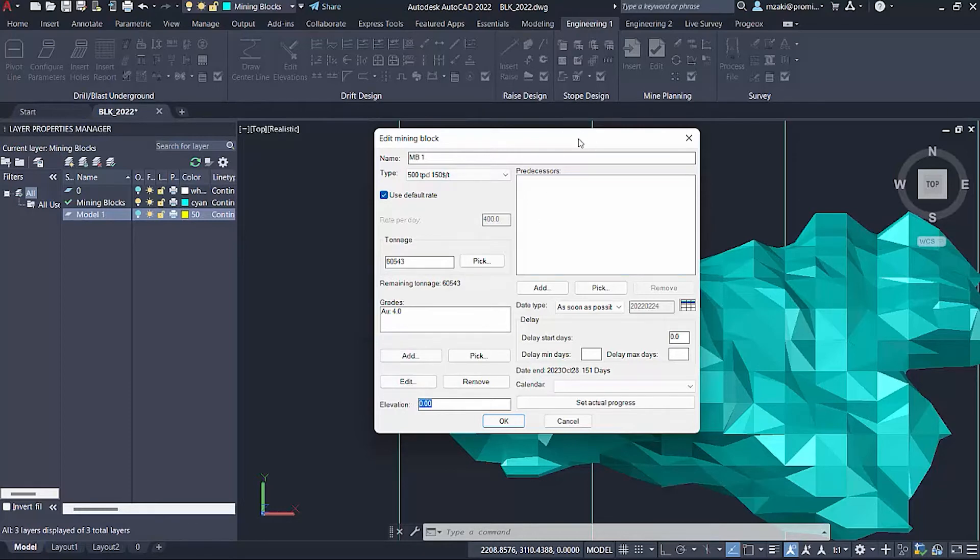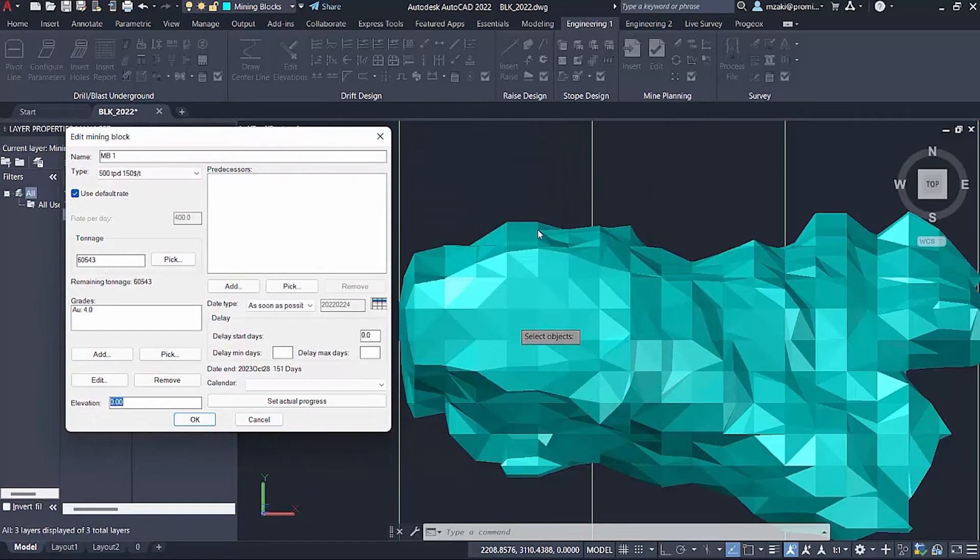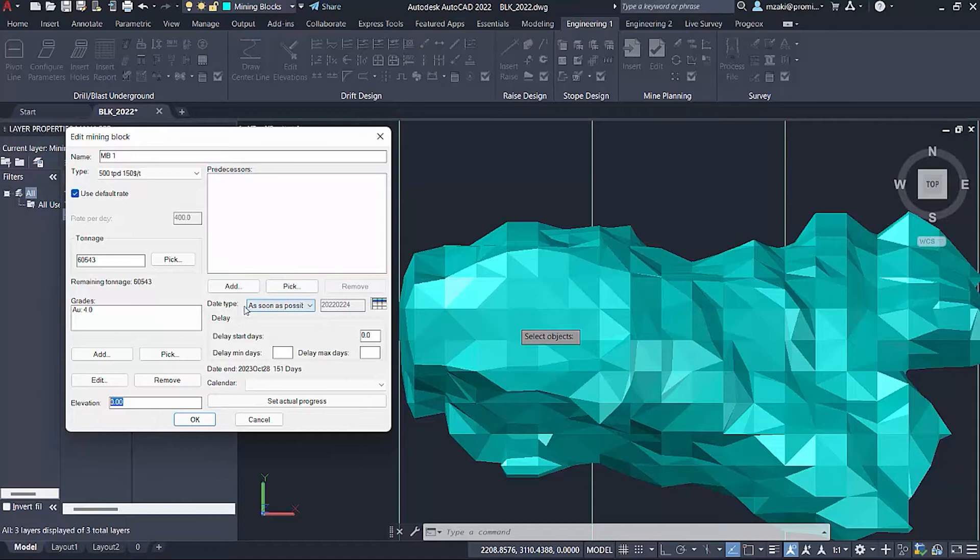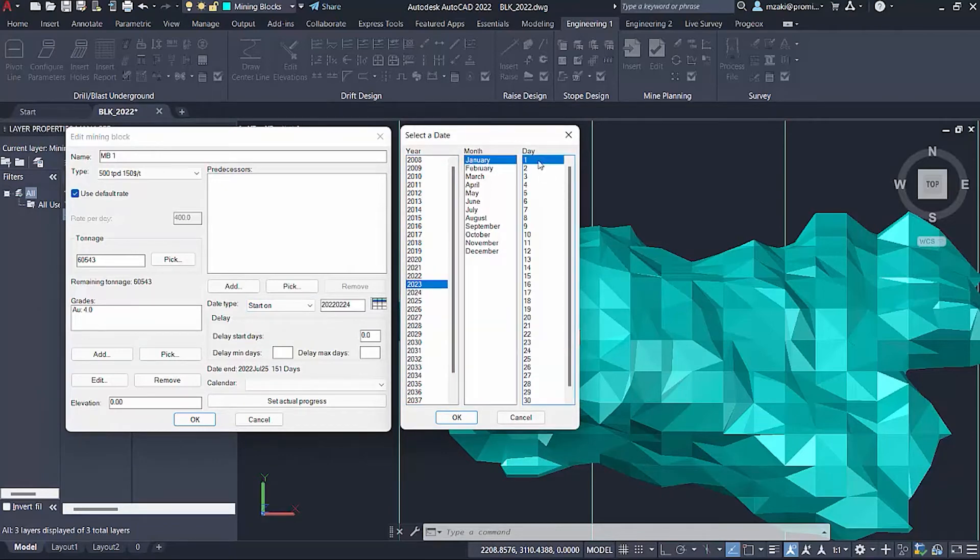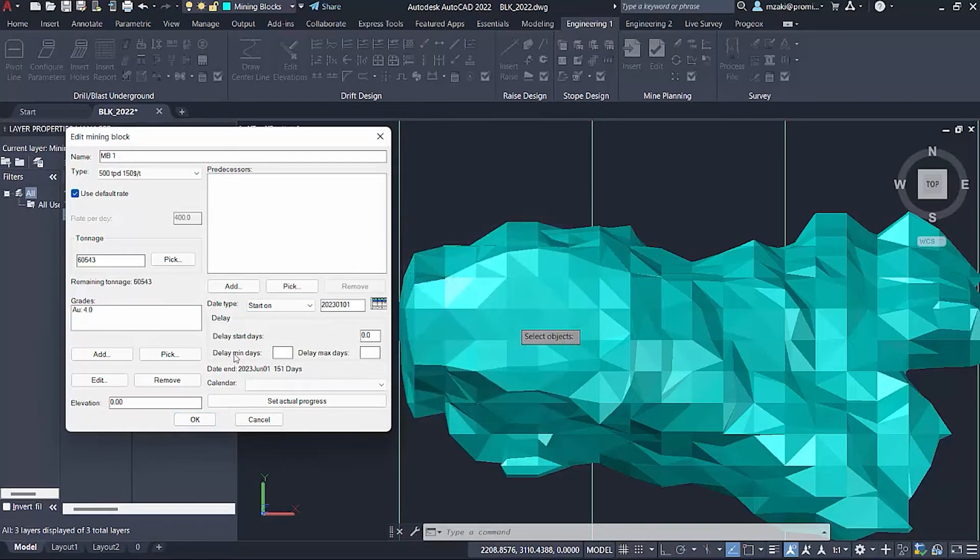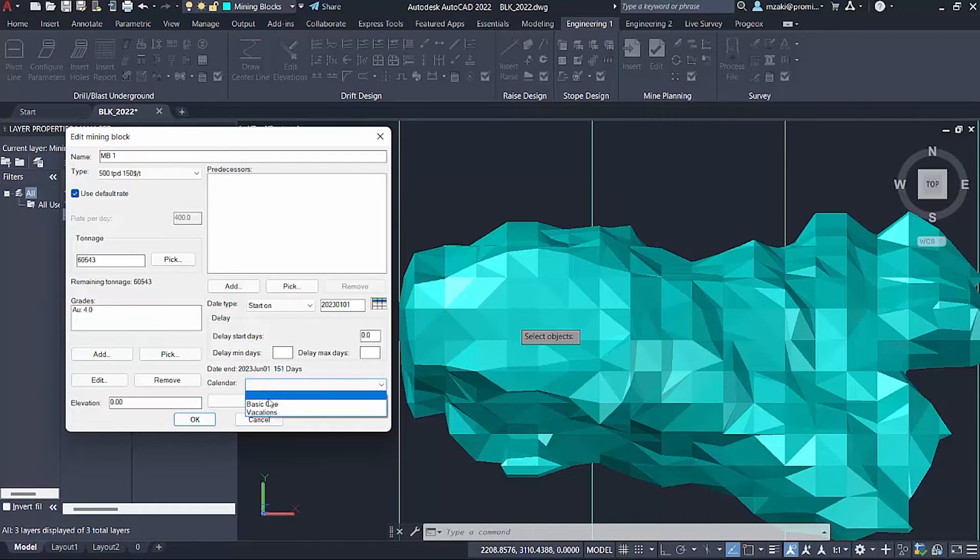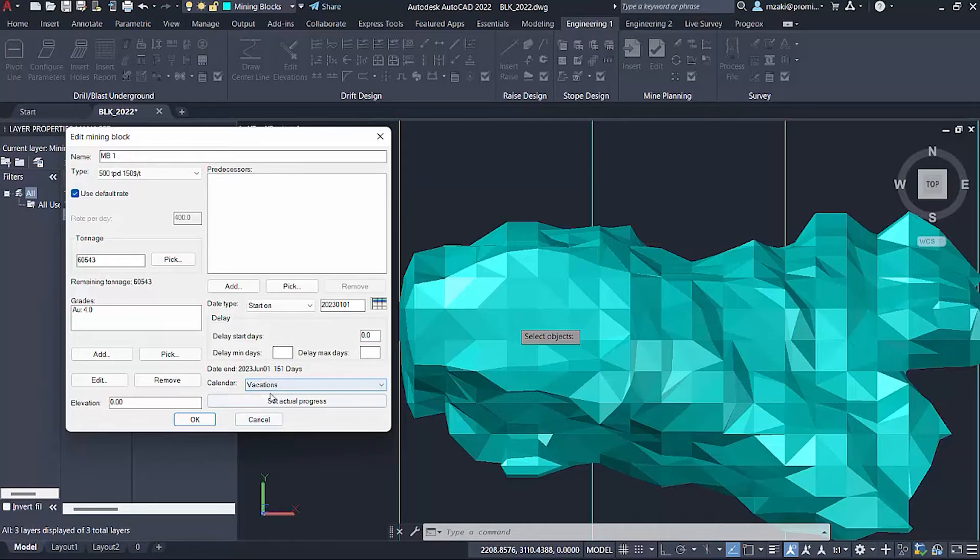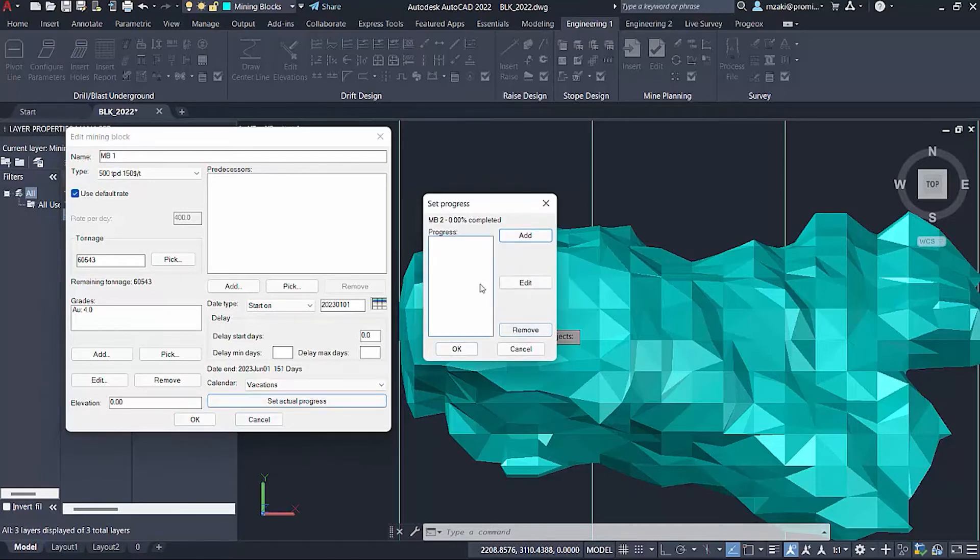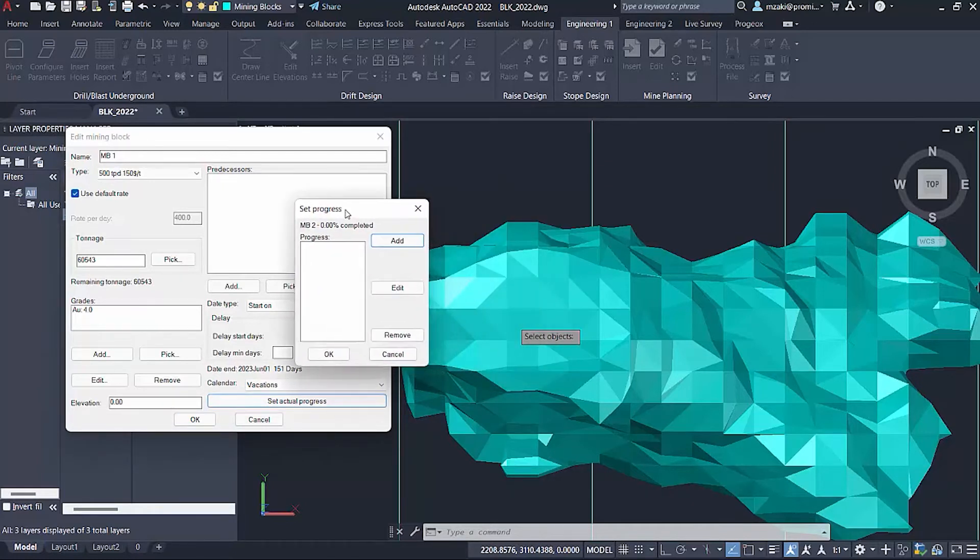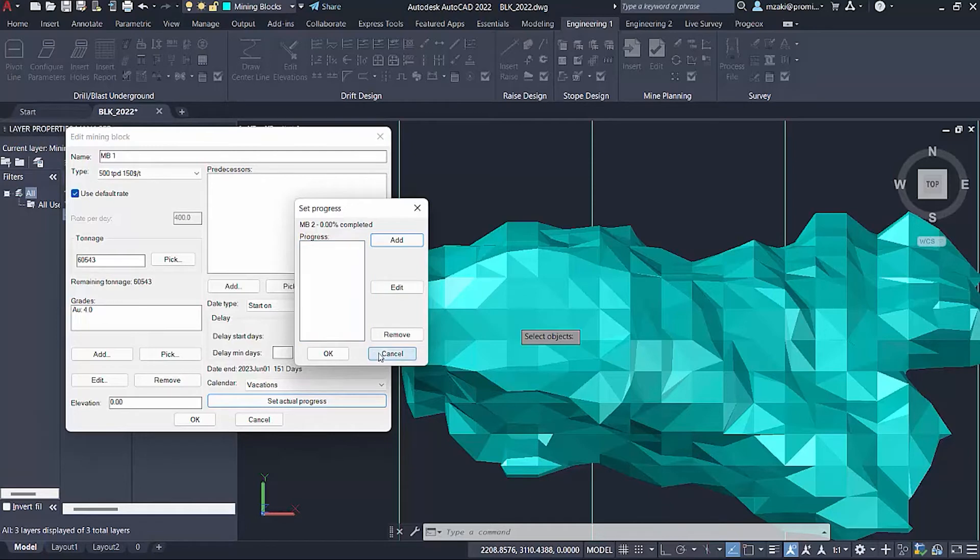The grades were retrieved from the option we picked, so we had four grams per ton. For the elevation you can leave this at zero. For the predecessors, since we're starting at the first piece, we don't need to add anything. However, we need to add a date. The date type will be start on, pick your calendar and select 2023, January 1st. You can also add a delay if you have any issues at the mine. For the calendar, we can apply different calendars for vacations. You can also set an actual progress, but in this case, because we're still planning this, we will not apply any actual progress.